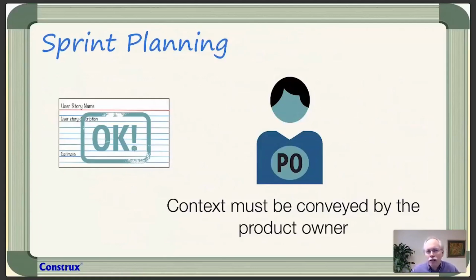That's how the product owner starts to interact with the team, because here's the story card. We're going to be touching it multiple times in its life. We touch it as it starts going into the top of the pile, as it forms a value path that we want to work on. We touch it as we refine it and get into a ready state. We touch it as we pull it into sprint planning and say, yes, let me tell you the story one more time again.